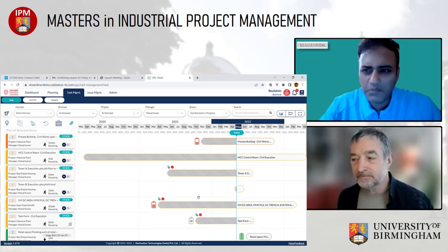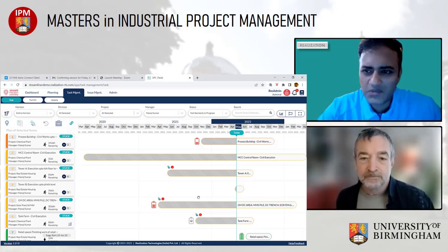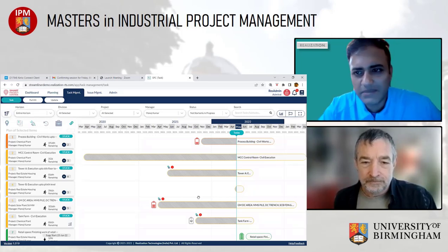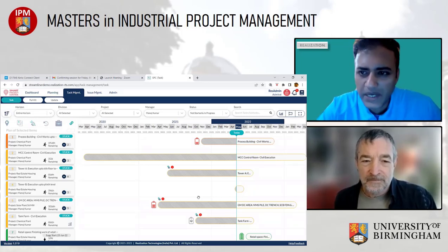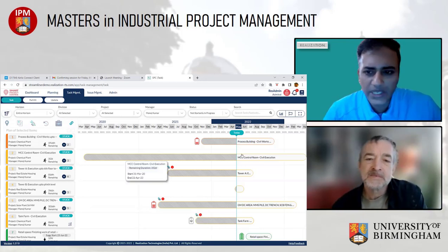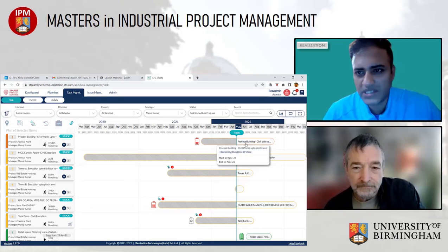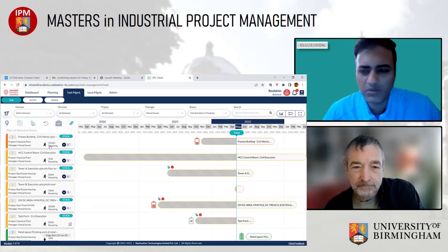So there's only one input which they're putting, basically how much work I did today. Apart from that, if they have to raise issues, they're raising issues. The system is arranging all of that. We are trying to give a feedback to everyone. So at the task manager level, the duration feedback is real time. So if this is showing 191 days, this is real time. The moment somebody makes an update, I would be able to see 191, whether it changed, whether it increased or whether it went down. That is real time.